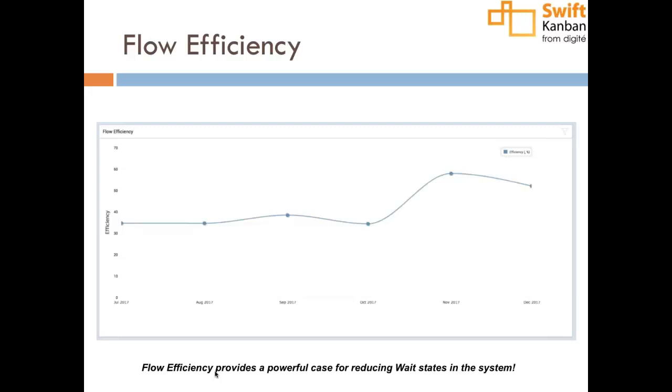In order to improve the consistency of your delivery in the standard class, you really want to control the wait time more so than the work time, because each piece of work takes what it's supposed to take to get done in terms of effort. But there is no reason why it should be waiting longer than others. Absolutely. Absolutely. All right, let's keep going.